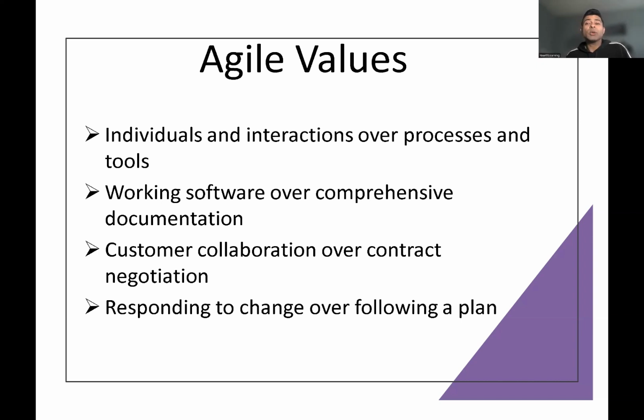So I will repeat again how the final product or the incremental product is made. You gather the requirement from the stakeholders, you put it in the user story, you get a formal approval of the user story from the stakeholders to make sure that you have captured everything correctly. When you get a formal approval over email, that's like, yes, I got the approval. Whatever I have noted down in my user story, that's what the subject matter expert wants. Once that is done, you bring your user story to the Scrum ceremonies, like Scrum refinement for the first time, where you will discuss what exactly needs to be done.